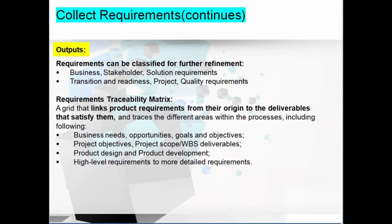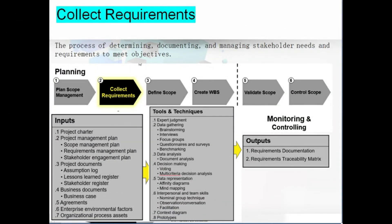The outputs of collect requirements are: requirements documentation and the requirements traceability matrix (RTM). Requirements documentation can contain various types of information, but must include acceptance criteria. The RTM — requirements traceability matrix — helps link requirements to objectives to ensure strategic goals are accomplished. We have now completed the second process in scope management — collect requirements — and will move to the next process, define scope.